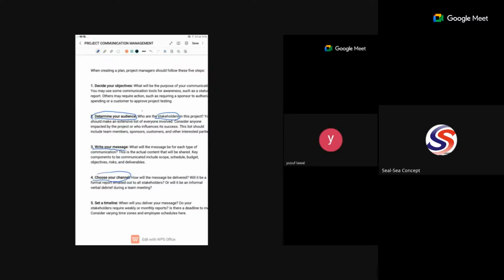The damage on the project has been done. It was only later that you were communicating to the stakeholders. Of what use is your communication when the damage has been done? But if you had communicated prior to the time of the problem, perhaps some of the stakeholders might have brought up suggestions. Those among them that have connections might have actually assisted to rescue the situation for you as a project manager. So you must set a time frame for your report or your communication.